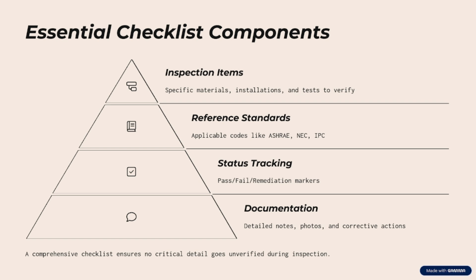Once the checklist is fully prepared, under the heading below you need to mention whether the work is done as per the project specification or project standard. You can mark yes, done, no, recommendation, or anything else you want, and mention it in the checklist.